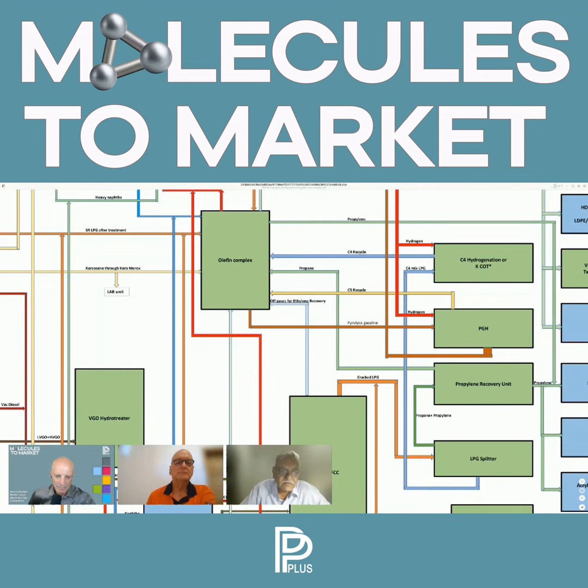That part of the work can be done in parallel, of course, while the technology selection is done for the petrochemical side, and so there will be phasing. The refinery could be in a position where you will be slightly advanced in terms of implementation, and the petrochemical block will come a bit later because there will be a phase difference.